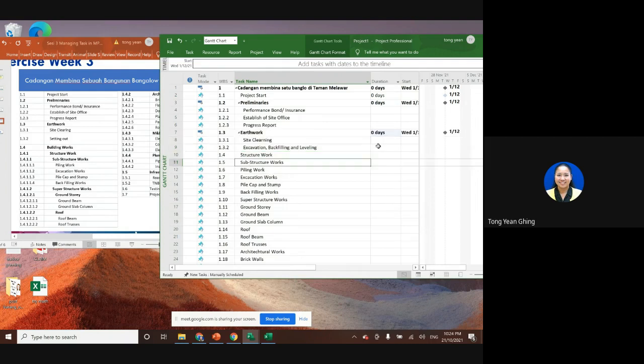And when we put it under the WBS, this title, preliminaries, will help us automatically calculate. Actually, once we put in the duration of each activity under this WBS, Microsoft Project will help us to calculate for each of these levels under preliminaries how many days we need to finish all the activities under this preliminaries.